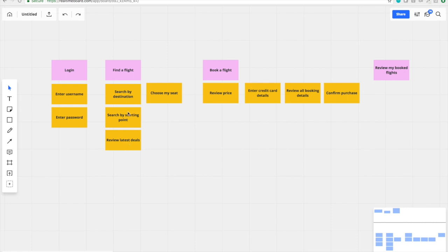Now I've stacked them in this order because I've communicated what's the likely value to a user. And in the world of agile development, that equally translates into a developer's backlog. So we tend to have the higher value user stories, or the more critical ones, at the top of a backlog. They will get tackled first in early sprints. And so here, when the design team are starting to move things around and decide what's of most value, that's also going to be translated into development work later.